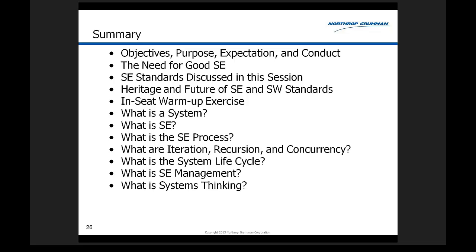Absolutely. He said, what do you think of project control based on earned value, measured as requirements, implemented and tested? Yeah, yeah. It's very effective to measure the amount of requirements implemented and tested, verified, as giving yourself credit for earning the value budgeted for those requirements. For example, a set of requirements would have a certain value associated with implementing and verifying that those requirements were met.